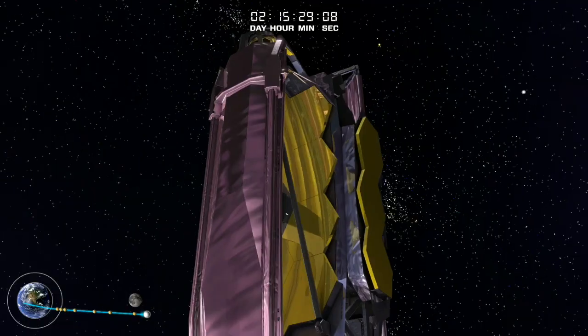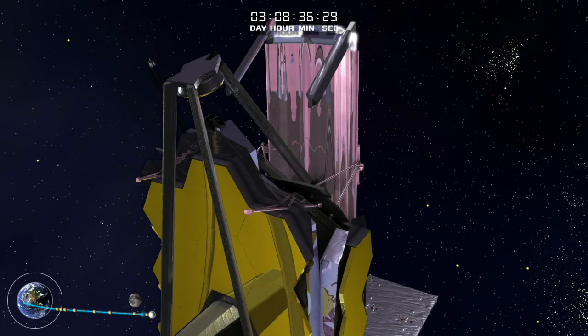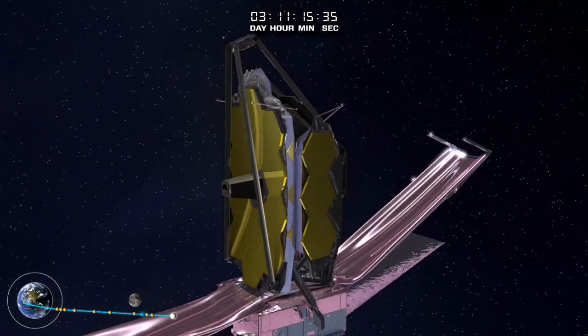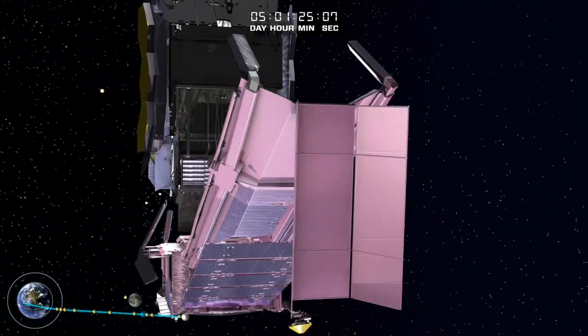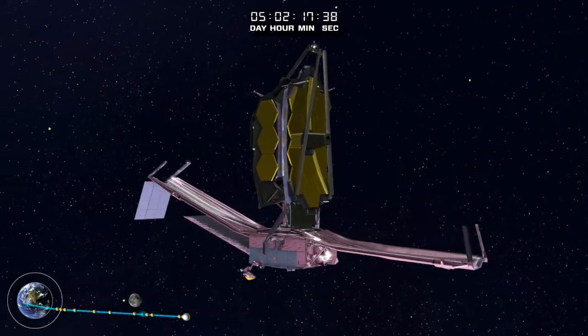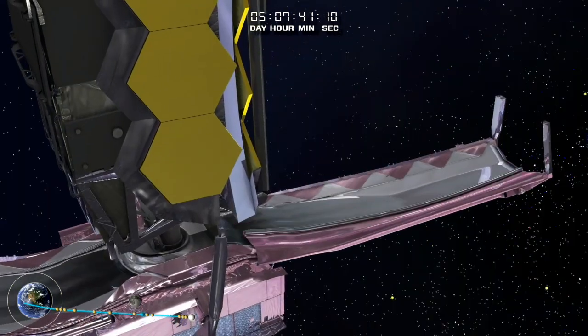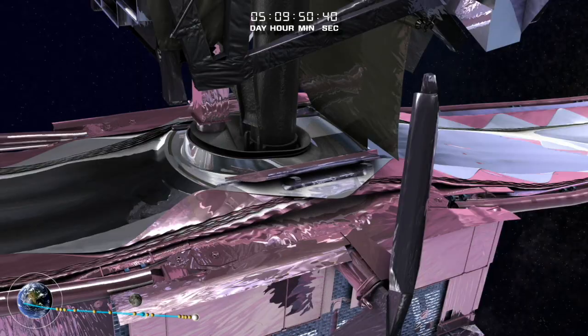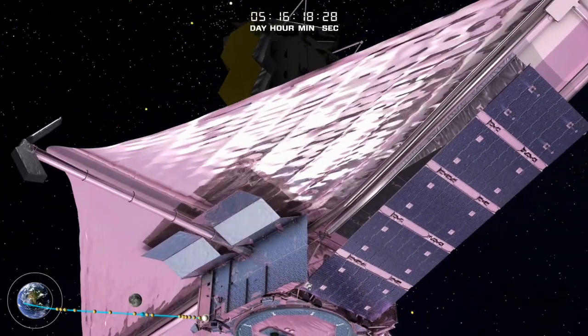So you asked about our timeline. Our timeline is down to the minutes. We know every minute of every activity, what we're actually doing. So it's really, really detailed, and obviously it started from broad brushes to really fine details. You take that timeline and you start rehearsing it, and rehearsals come in all different flavors.